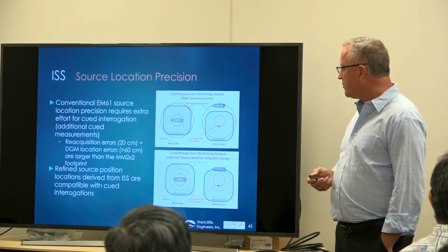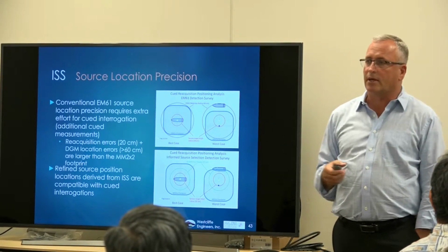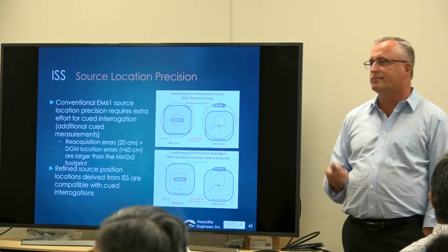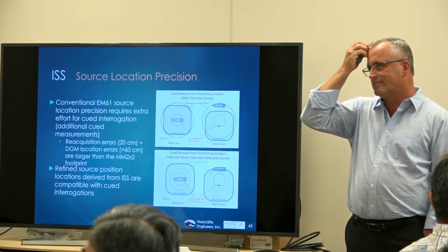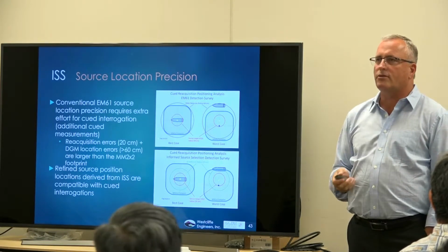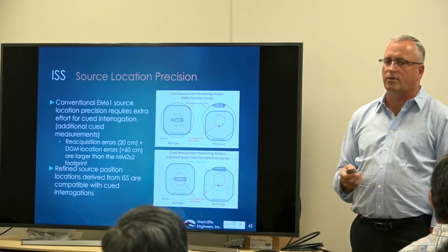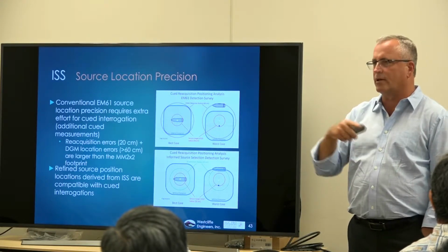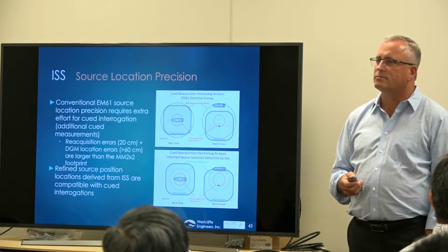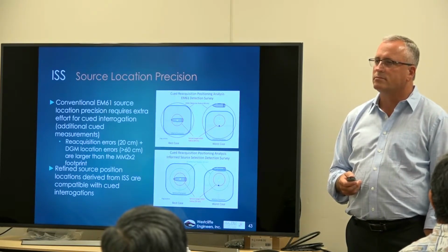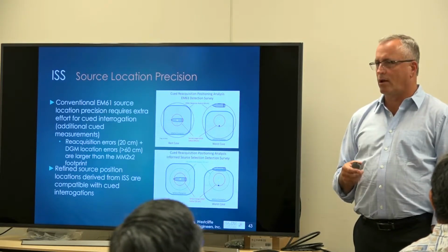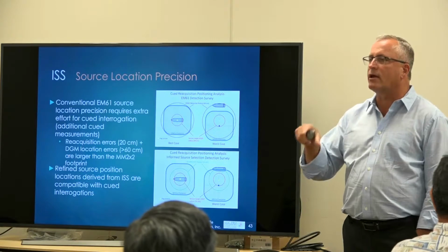It happened on a recent project down in Wall. Basically, they have to overpick to account for that. And then, especially out here with our issues of clutter and geology, we get giant pink blobs. Where do they go cue then, if they do their dynamic collection with this? Yeah, if you get a giant pink blob, I think what you have to do is just circle it and investigate. So we're going to have to go in with a planned approach of AGC, and then delineate mag and dig areas throughout as we realize which areas it works and doesn't throughout the life cycle of the project, with more precision and more granularity than you normally would.